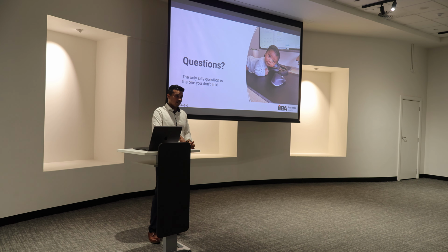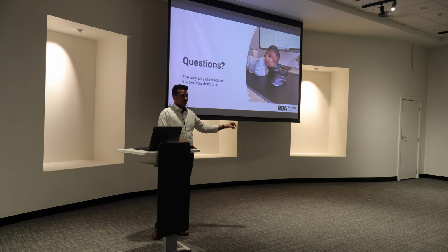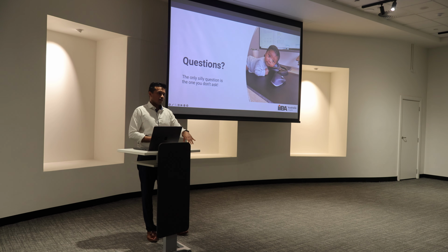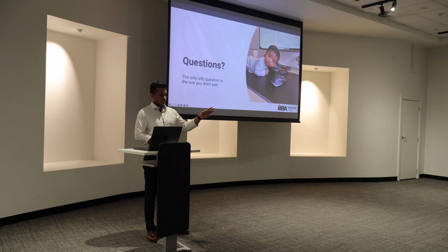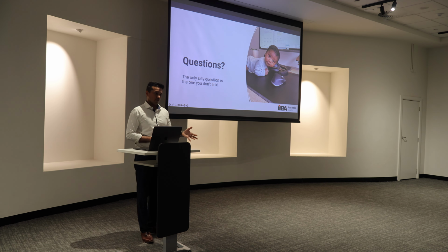Scope creep's been a big one, because you start with a very small scope. Some projects in some small startups that I worked on, they had little budgets of like 100,000 to just implement a small CRM system for a small business. That ended up becoming 300,000. The same happened to a not-for-profit right here in South Bank. That ended up becoming the same budget as well.